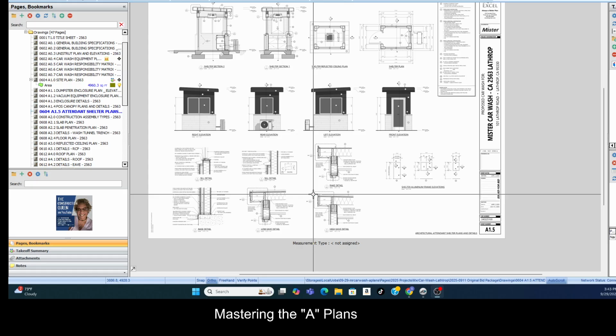The framer used the plan view to measure how many linear feet. The roofer can use the roof plan to measure how many squares. The painter can use the floor plan to measure his walls, but you've got to be able to figure out height. The roofer has to be able to figure out his insulation. Can't do that from an area on a roof plan.